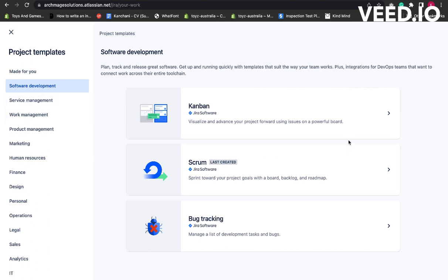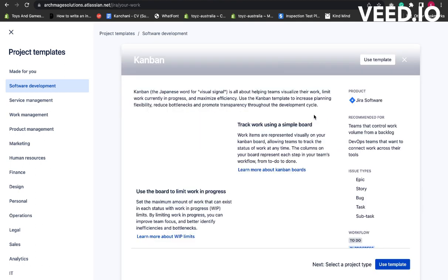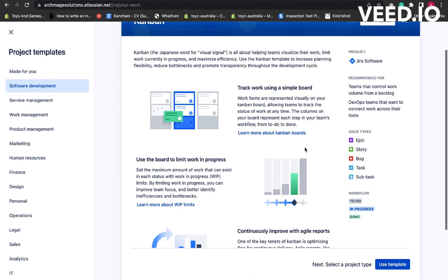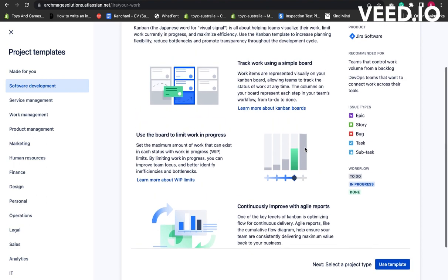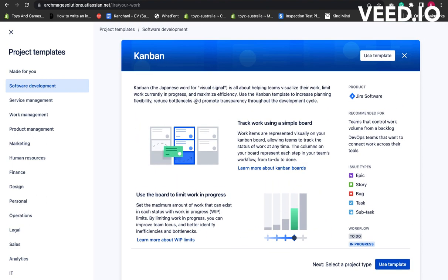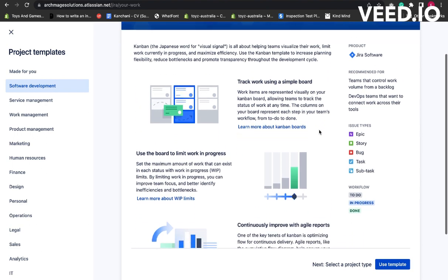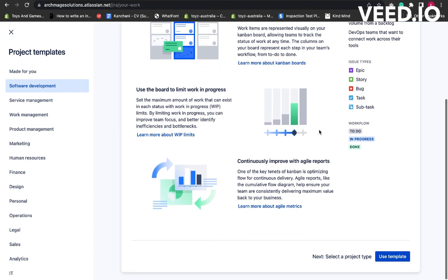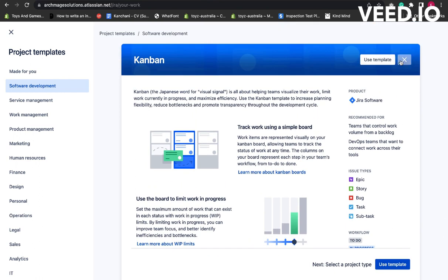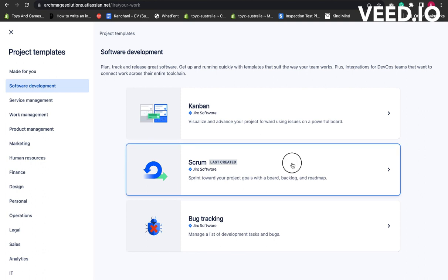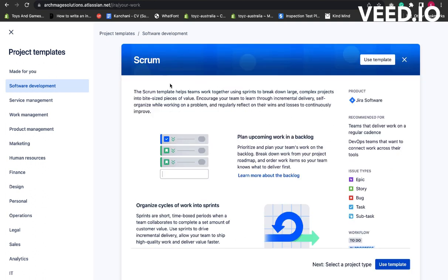At Archmage, we usually use two types of projects, which are Scrums and Kanbans. The key difference between Scrum versus Kanban is that Scrum describes an iterative, sprint-based framework that helps small teams solve complex problems, while Kanban is more singularly concerned with how work items flow through the development process. Both Kanban and Scrum are pull-forward frameworks. You don't start something new until you finish something else.